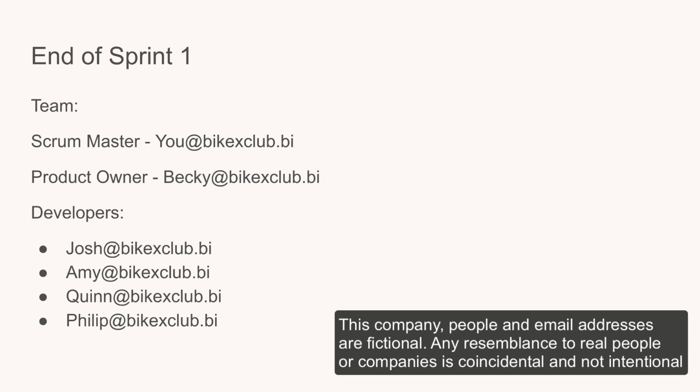As a Scrum Master, you'll be taking notes and you'll want to share what you've written down, those notes, at the end of the meeting, so that it's transparent to everybody, and you will want to take actions as well. When people come up with advice and feedback and things need to be actioned, you make a note of it and the relevant people are assigned to those actions, and then you as a Scrum Master can follow up on those actions throughout the next sprint to make sure that they are actually done.